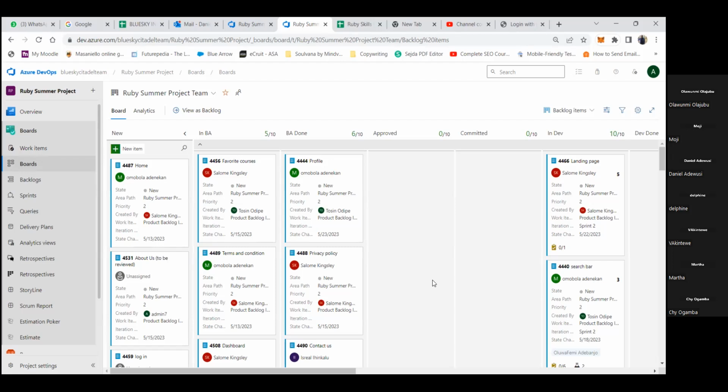I want to ask, should I say now that we are going to re-estimate this story, or is it only the QA who will estimate? Depending on the work that is left on it. Yeah, so assuming it's story automation that is remaining. If that story is sitting in in-dev at the end of your sprint and you need to spill it over, I would say don't split it, because the developer has not completed his work. So everything can go into the new sprint.